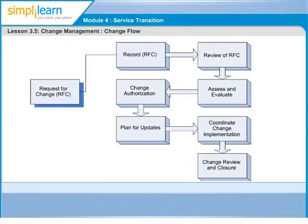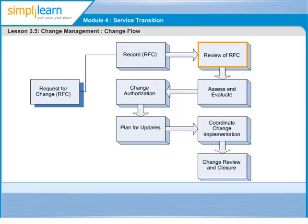The change management process starts with a Request for Change, or RFC in short. The RFC is a record in the change management system that allows information to be captured and tracked through to completion. The RFC is logged, and an initial review is performed to filter RFCs — for example, if it is incomplete or incorrectly routed.